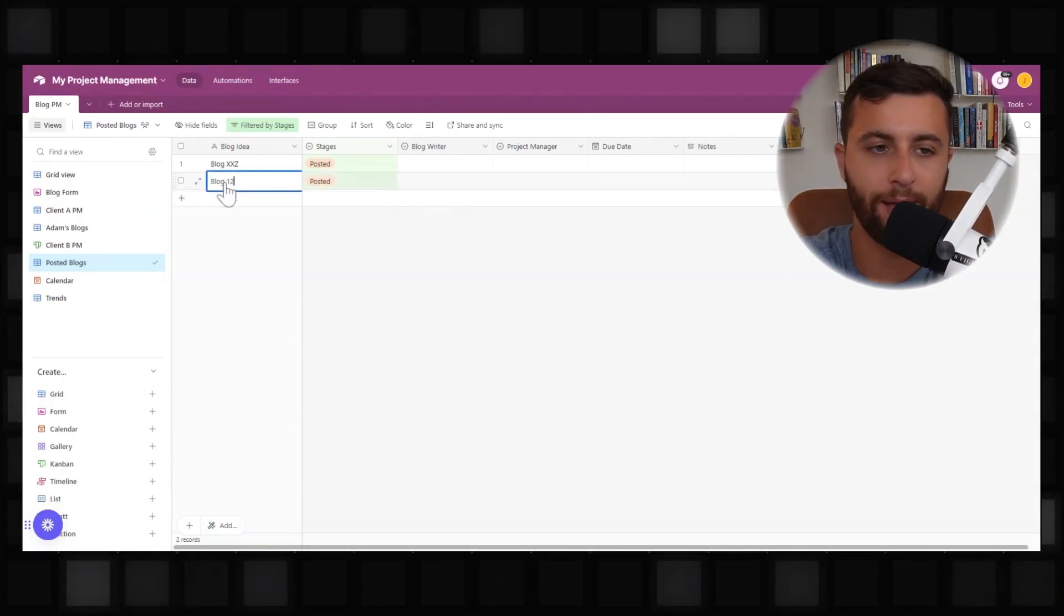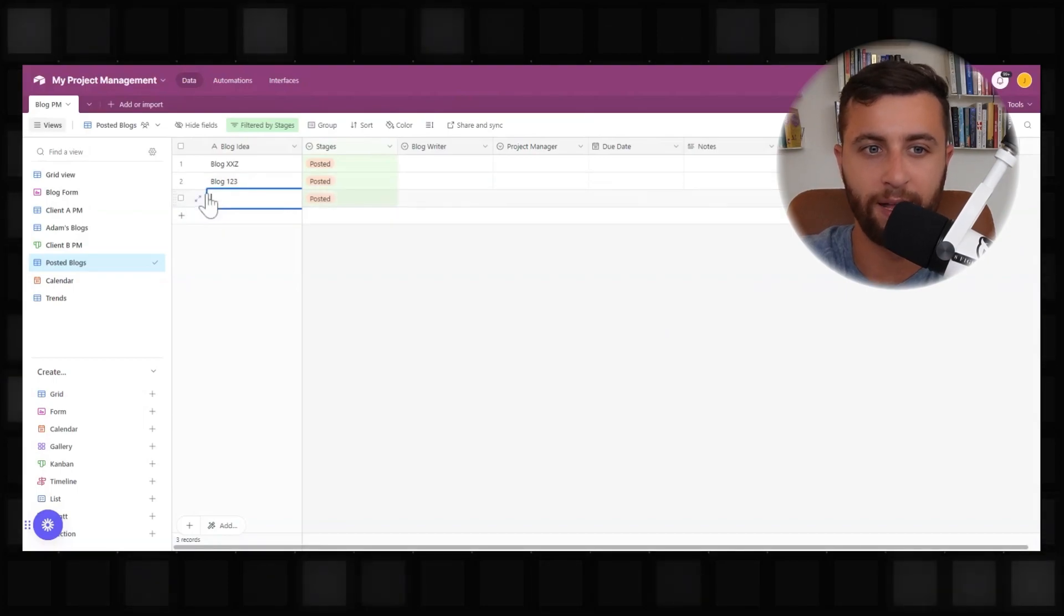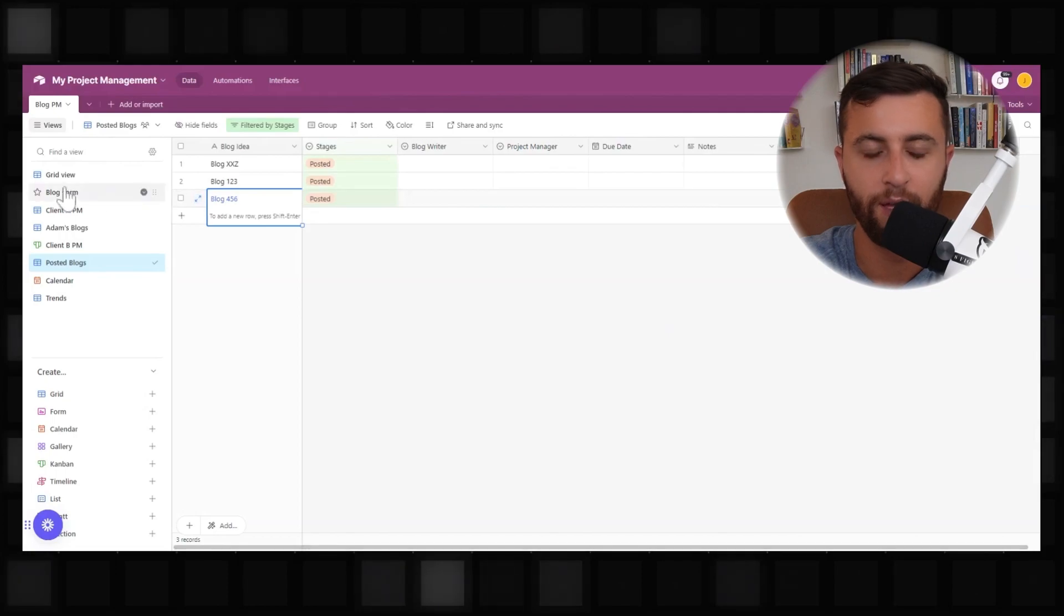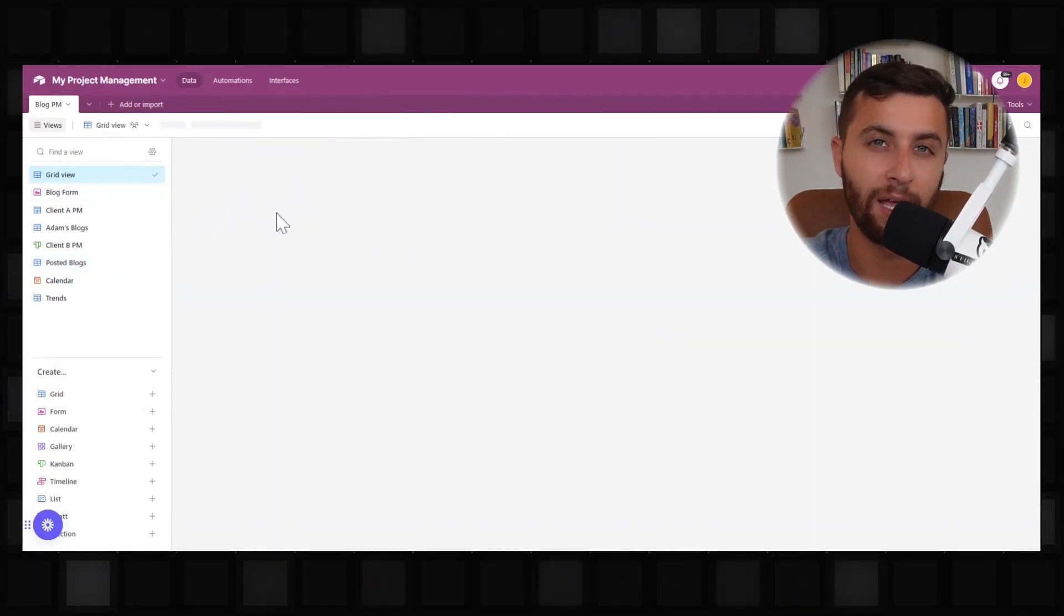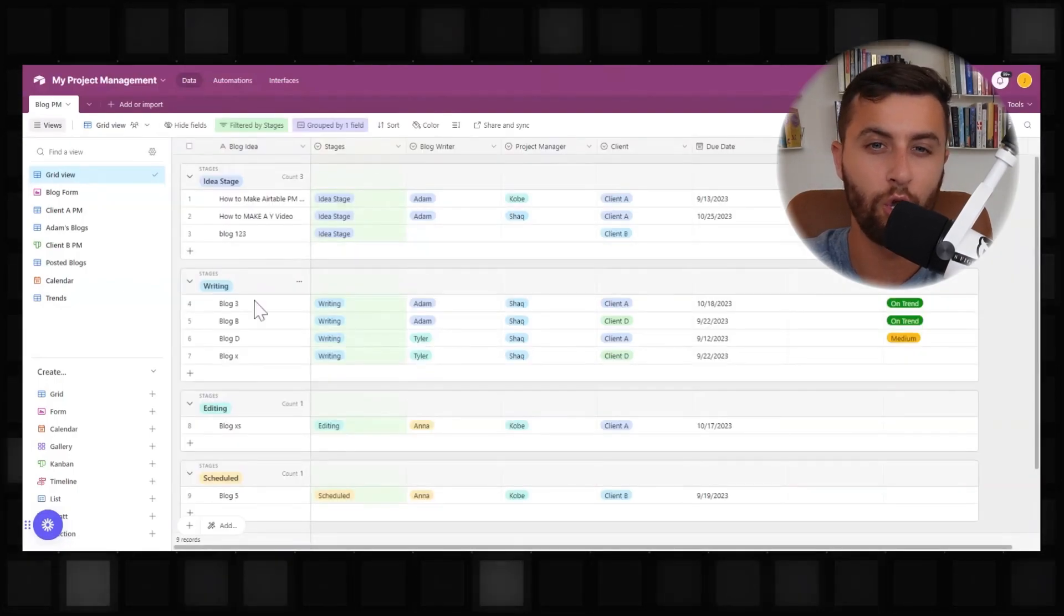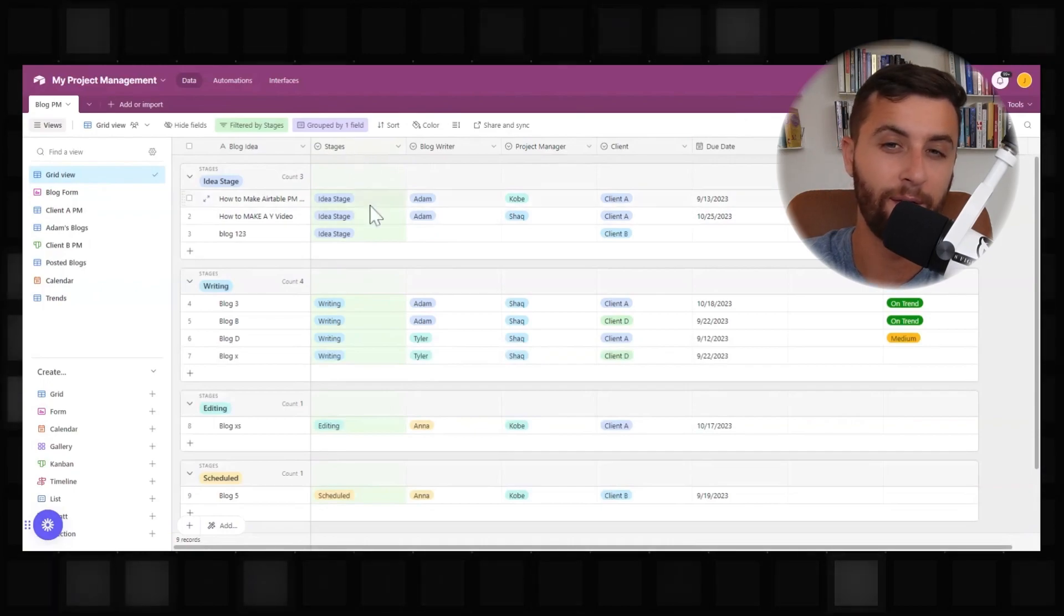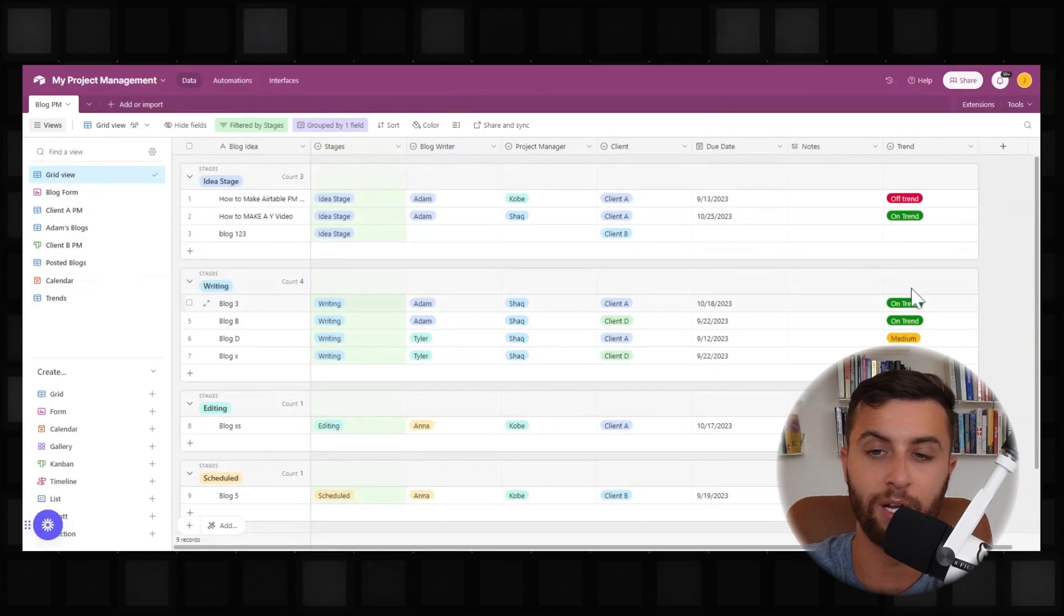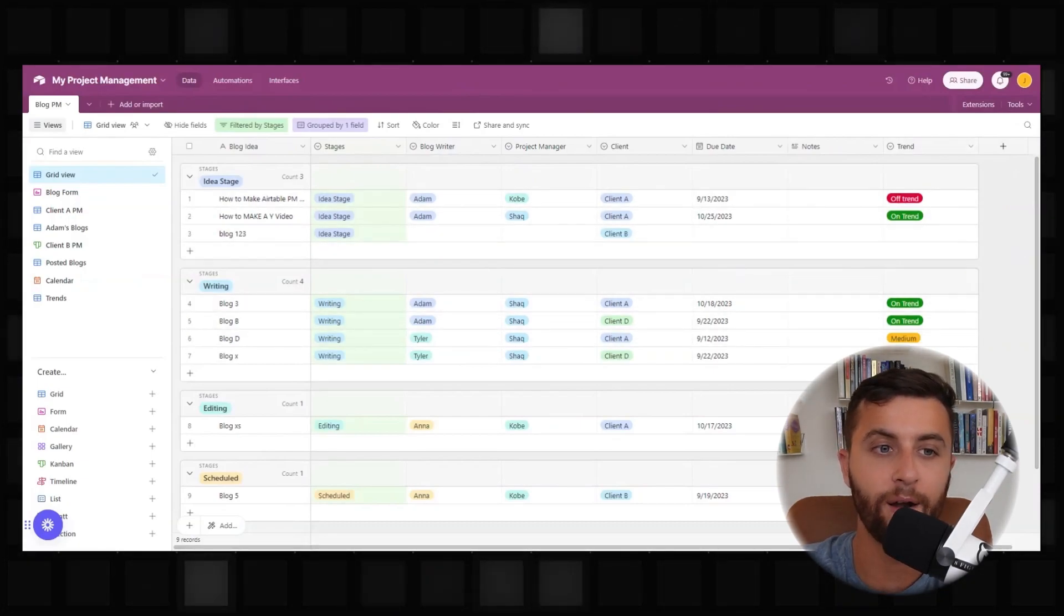So kind of going back high level, in order to set up Airtable really effectively, you want to first and foremost, set up your category as your main column. From there, I like to identify what are all the different things that I need to have to stay organized. For me, where are the stages? Who is the owner of these projects? If it's related to a client, what's the client? When's the due date? Are there any notes? And is it on trend or off trend?